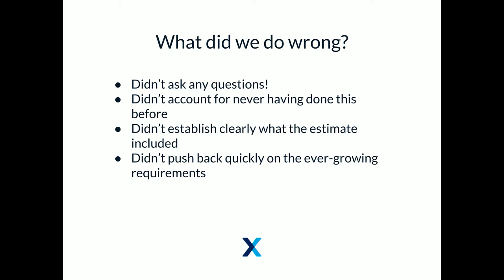We didn't clarify at all. We took their request and we said, that's going to be 5 hours. So they said in their heads, okay, the thing we want is going to take 5 hours. And then the last mistake we made was that throughout this process of 8 months, there was very little pushback on them to say, hang on a minute, I understand that you want to keep doing more and more work on this, but that's definitely not what we originally discussed, and we're kind of feeling like this is going a little bit above and beyond.